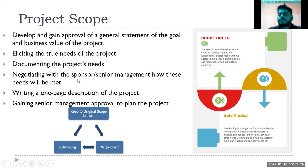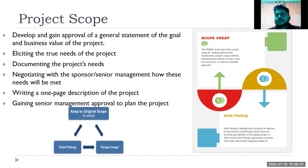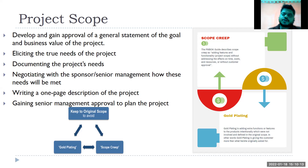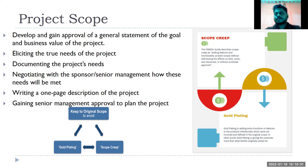Negotiating with the sponsor and senior management about how these needs will be met, because customers want everything at the lowest cost with the least possible time — which is not always possible. Think about the Indian government asking DRDO or HAL to build a fifth generation aircraft within five years. We took 20 years to develop a light commercial aircraft. So whoever leads that organization has to come forward and negotiate what is possible and what is not possible.